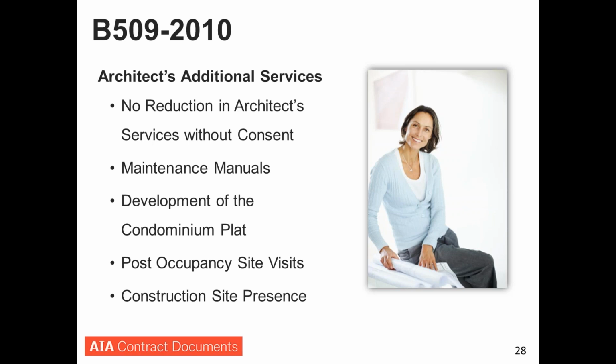Here you're going to have the agreement with the developer, but then there are all of the unit owners. If there's a failure of the roof and a special assessment is made and all of the unit owners have to contribute, they all want their money back. Or if a defect is found in one unit but it's repeated in the other units, that all just multiplies. And that's what a lot of the risk management we'll be talking about will go to helping to mitigate here.